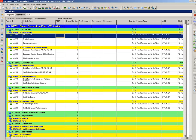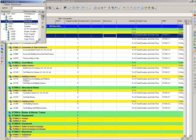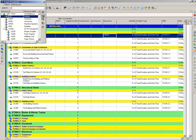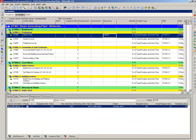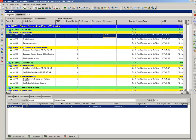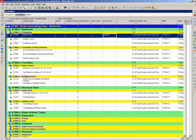Clear and grab, we'll need a labor. Labor. Now I'll show you on the activity detail that this worked. Budget units: eight hours a day max, eight hours. Remaining units, or I'm sorry, budgeted units: 56. That's the duration of seven times eight hours, 56 hours. It works. Get rid of this.